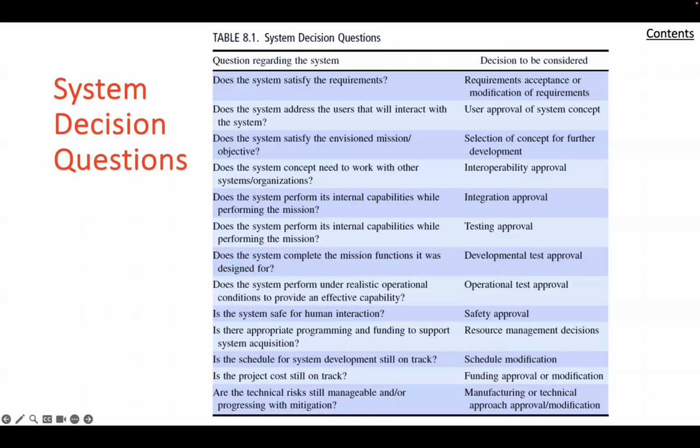The life cycle stages start with exploratory, that is investigating new opportunities, concept, which is evaluating concepts and stakeholder needs, development, which is planning and risk management, production, which is producing and testing, utilization and support, which is operating and providing a sustainable capability, and retirement, which is storage or disposal. You can refer to the INCOSE Systems Engineering Handbook for more details on that.